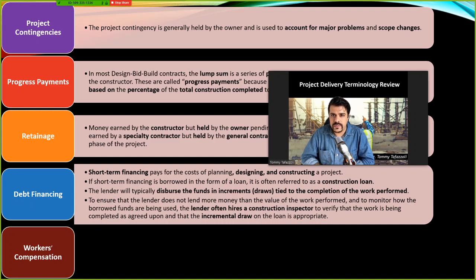It's a construction loan, and the lender will typically disburse the funds in increments that are tied to project expenses. It means they give the loan to you periodically and that comes in incremental portions. So the constructor will have sufficient funds to progress the project towards its completion.